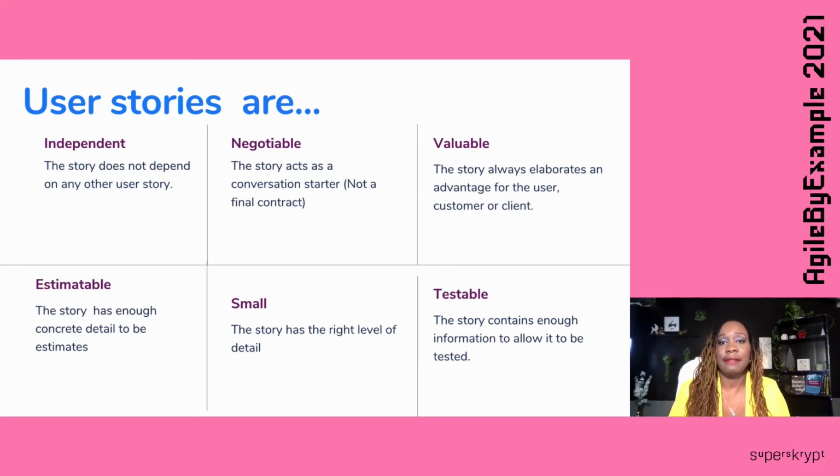Sometimes user stories that I've seen in the past may be too small. You can't really estimate it, or too big. It's like, you have to break this up. It's way too big. But the user story ideal size should be small enough for you to be able to estimate it, but valuable enough that it gives some value to the user.